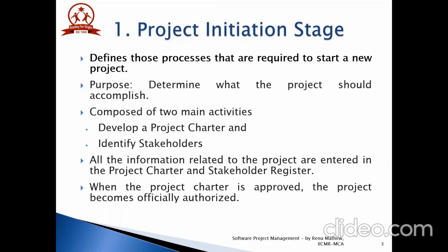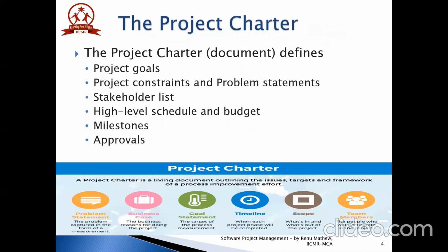The project charter is a document which defines the project's main elements such as project goals, project constraints and problem statements, stakeholder list, high-level schedule and budget, project milestones and approvals. This document allows the project manager to utilize organizational resources for the sake of the project. To create a project charter, the inputs required will be the enterprise environmental factors, business cases, agreements, a project statement of work, and organizational process assets.